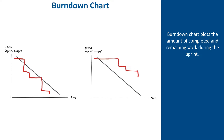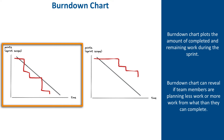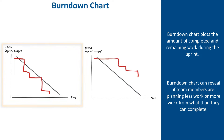For example, with the help of the burndown chart, we might see that the team is often finishing its work faster than planned, which could indicate that team members take less work during the sprint planning than they could actually complete.